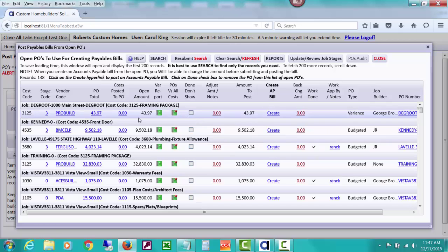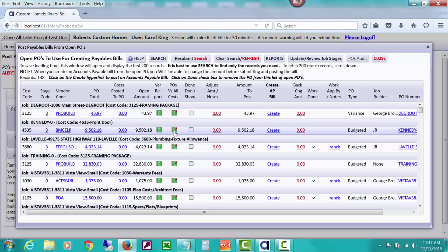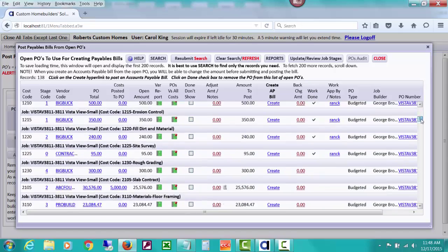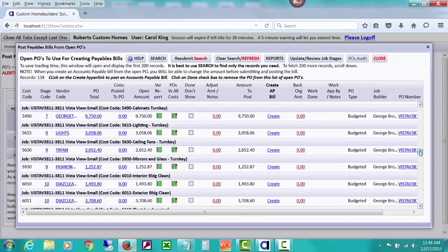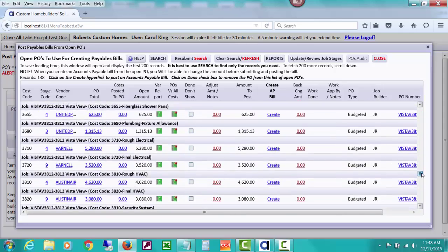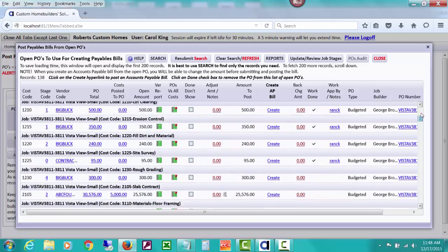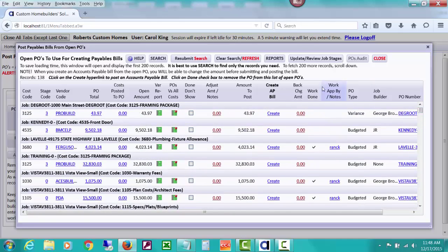We were looking earlier about approving POs to pay, about how everybody can drill down to a variance report to see if it's over, see the purchase orders versus costs, which is actually that same window we were just looking at for POs and cost management. They can see whether the work is done, and they can see whether any little notes have been pinned to that done work. I think we probably went ahead and posted a bill from something that did have a pinned note to it, from the field.